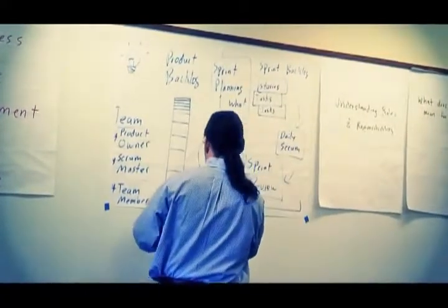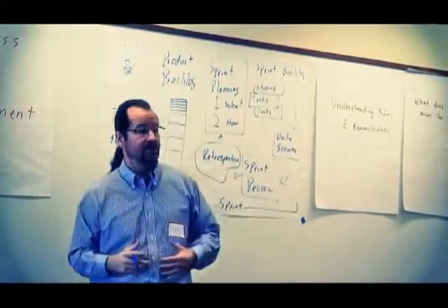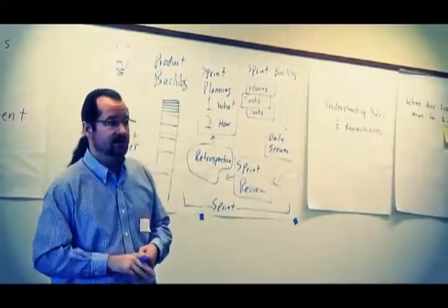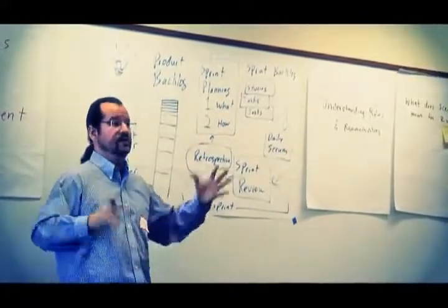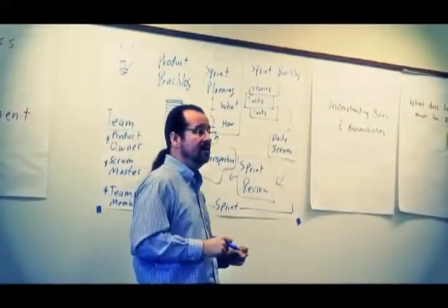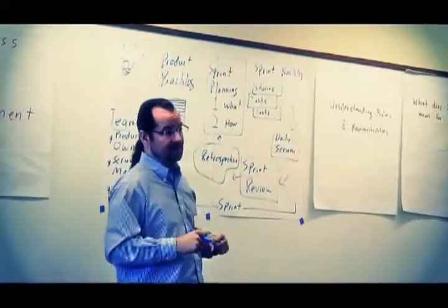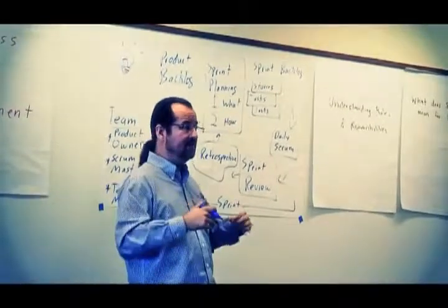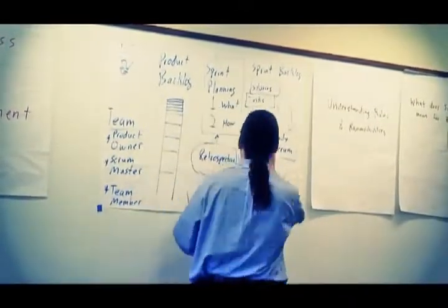And it's a fixed time box. Maybe it's 1 week, maybe it's 2 weeks. Some places do sprints as long as 4 weeks. I'm seeing less and less of that, but it's a fixed time box. These are all the official Scrum meetings. There's one more. It's not an official meeting, but lots of teams do it. I highly recommend it. It's usually called story time.